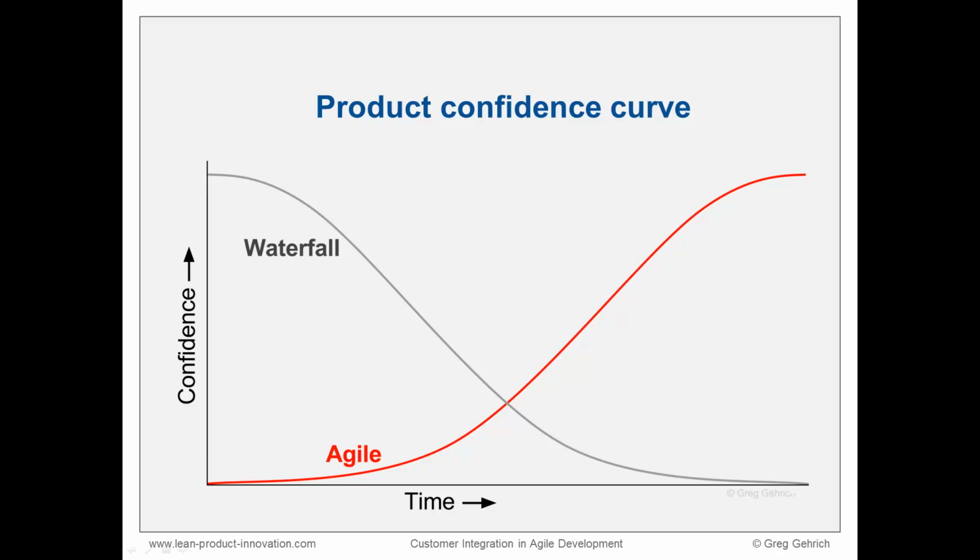In contrast, Agile's confidence is initially low due to all of the unknowns. After all, this practice doesn't spend 6 months talking to customers and designing the system. Instead of counting tasks to measure progress, customers are exposed to the product early and often, and validated functionality is used to grade that progress. Customers ultimately want something that solves their problems, not a product that followed a project plan. Confidence rises as corrections are made, product value is added, and customer expectations are met.